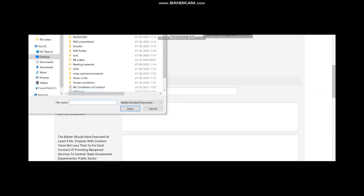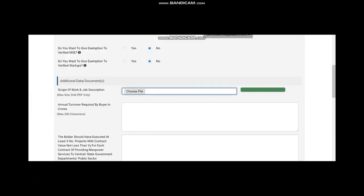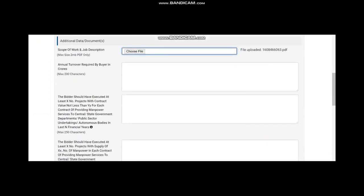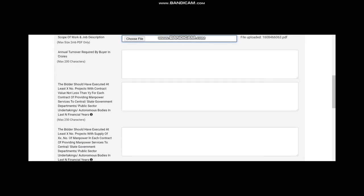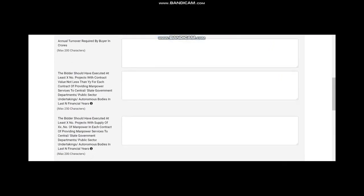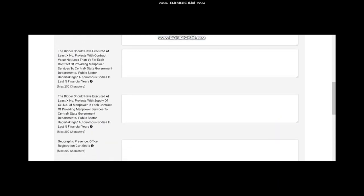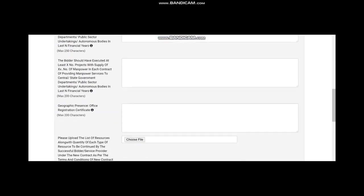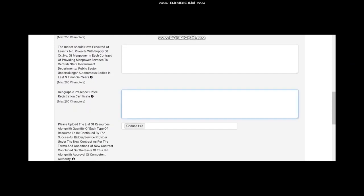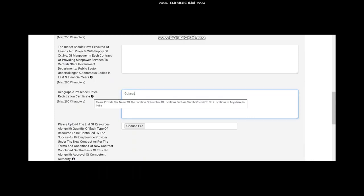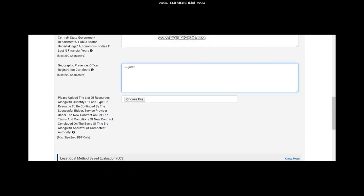Now that scope of work, what you have prepared, you must upload here at this stage. The scope of work will say that nature of work and whom to report and all those things. There are other columns also here. Try not to fill up these columns because during your technical scrutiny, you need to check these things yourself. If you try to keep it to the minimum so that you don't face problems. Only I would suggest that for geographic presence, you can give your state name. Basically, if he is not from your state, he will not be able to become eligible, basically. So, that is the only criteria you should give.